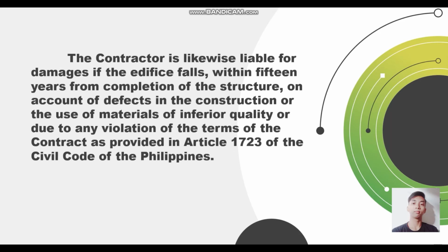The contractor is likewise liable for the damages if the edifice falls within 15 years of completion of the structure on account of defects in the construction or the use of materials of inferior quality or due to any violation of the terms of the contract as provided in Article 1723 of the Civil Code of the Philippines.